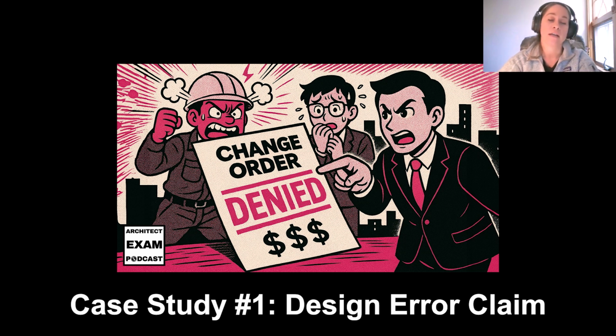So essentially, they're going to get a cost analysis from an independent estimator to compare it against the contractor's cost. Eventually, they're hoping to reach a settlement, which is going to allocate the costs between the parties with the architect's professional liability covering a portion, because the architect did admit that they poorly coordinated those drawings. So the architect's insurance, their professional liability insurance, is going to cover a portion of that cost.